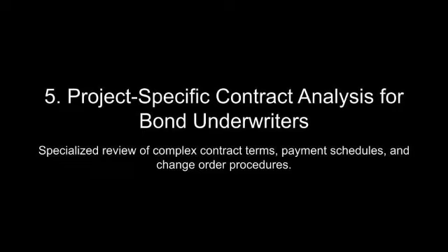Second, underwriters should review the indemnity clause for clarity and enforceability, ensuring that it does not contain ambiguous or overly complex language that could lead to disputes. For example, a poorly drafted indemnity clause that fails to specify the types of losses covered or the conditions under which indemnity applies may be subject to varying interpretations, creating uncertainty and legal challenges.